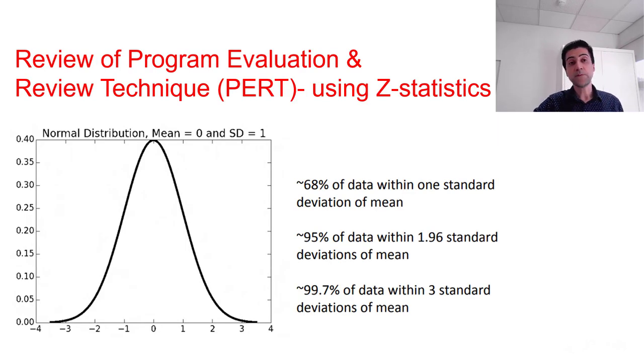Previously in videos we had before, we talked about program evaluation and review technique, or in short PERT. The underlying statistical distribution that we assumed in PERT was beta distribution, which is to some extent similar to gaussian or normal distribution, and Z statistics were developed and tables were used to quantify probabilities for different events. P50 is associated with the median of the distribution, and 50 percent of the area under the curve is associated with the P50 or median.